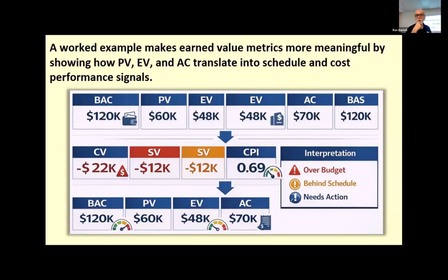Yeah. If the project is not done yet, how do we estimate the planned value? The planned value comes from the baseline. The question was, if the project's not done yet, how do you find the planned value? Well, you go to your baseline and say, okay, today is Saturday, April 11th. Go to the schedule baseline, the time-phased budget performance baseline I talked about, and say, what do we plan to do? So we plan to have, say, $150,000 worth of our work done in there. That's where it comes from. So always go back. Everything's compared to the baseline.